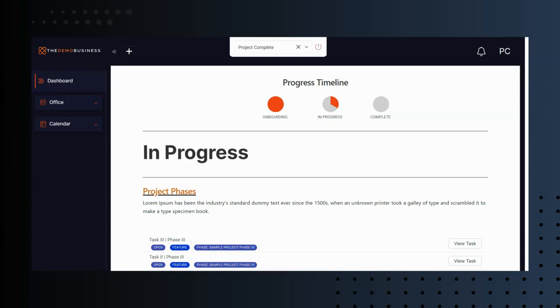And even when you add tasks, it will not complete the phase. I don't know if that makes sense. So basically, let's just say you have a phase that has 3 tasks, right? And you have something else you need to add. Well, you can add as many tasks as you want to. It also allows you to not have that phase completed until all of the tasks are completed.